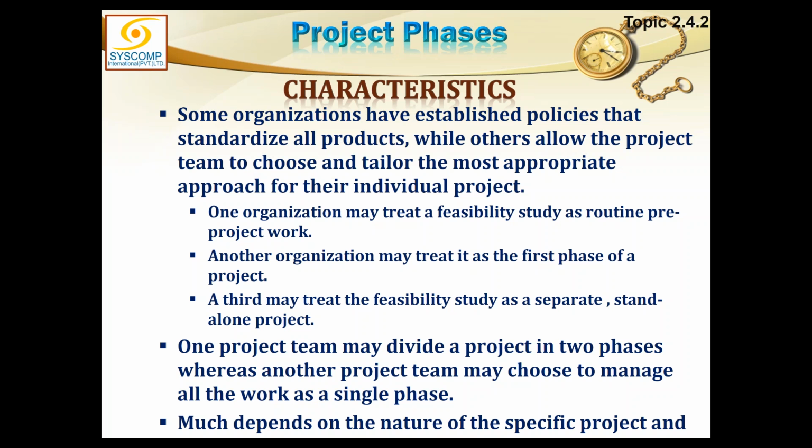Actually, this is what we did. We initiated it as a whole project. We started inventing and preparing and making the broader plan for the 5-year plan. And then we inducted the first one, and started initiating for that particular phase of the project. We did that for the first one, and then improved upon the process assets. Then did the second one, improved the process assets further. Then the third, the fourth, and the fifth, and then we closed the entire project.